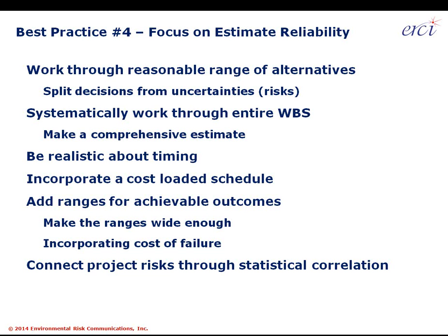Systematically working through the entire work breakdown structure, making sure that a comprehensive estimate is performed on a rigorous basis. Being realistic about timing, which includes the probability of enforcement or non-enforcement, and remedy failure, whether it is likely or impossible, does need to get explicitly stated. Pulling that information into a cost-loaded schedule is a newer requirement for companies that are using cost monitoring or cost reporting as a basis for paying vendors.